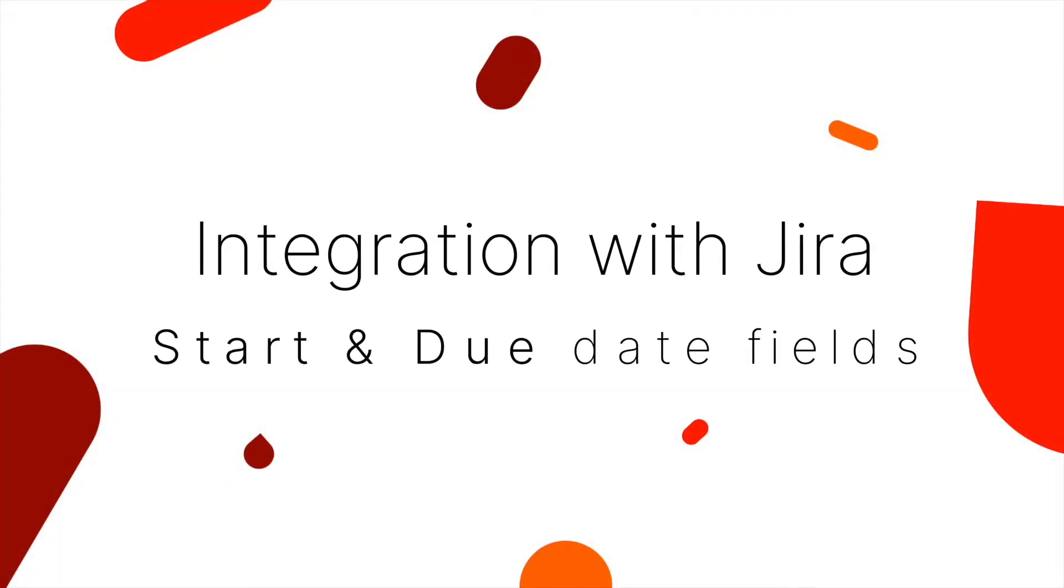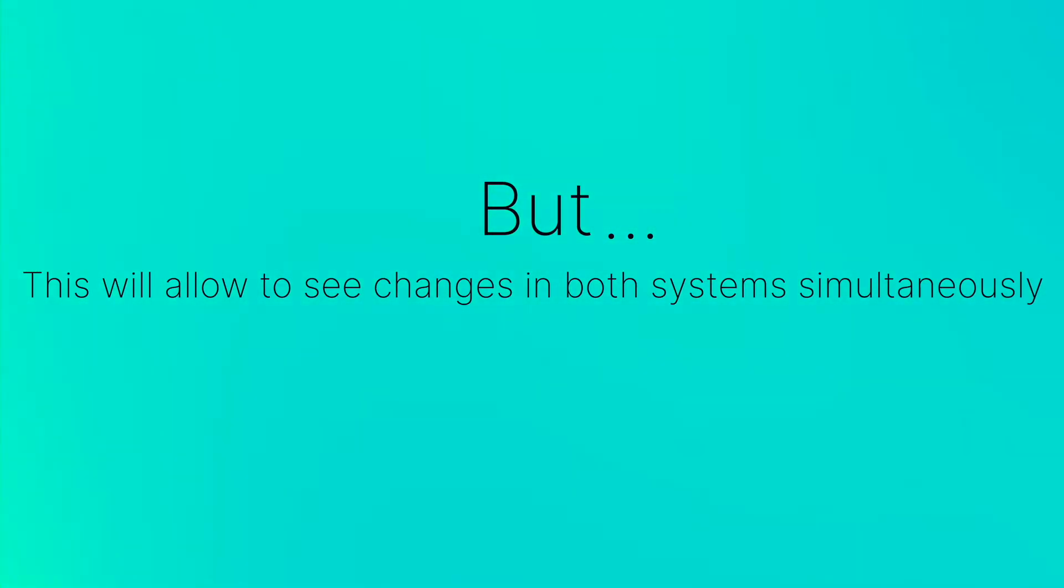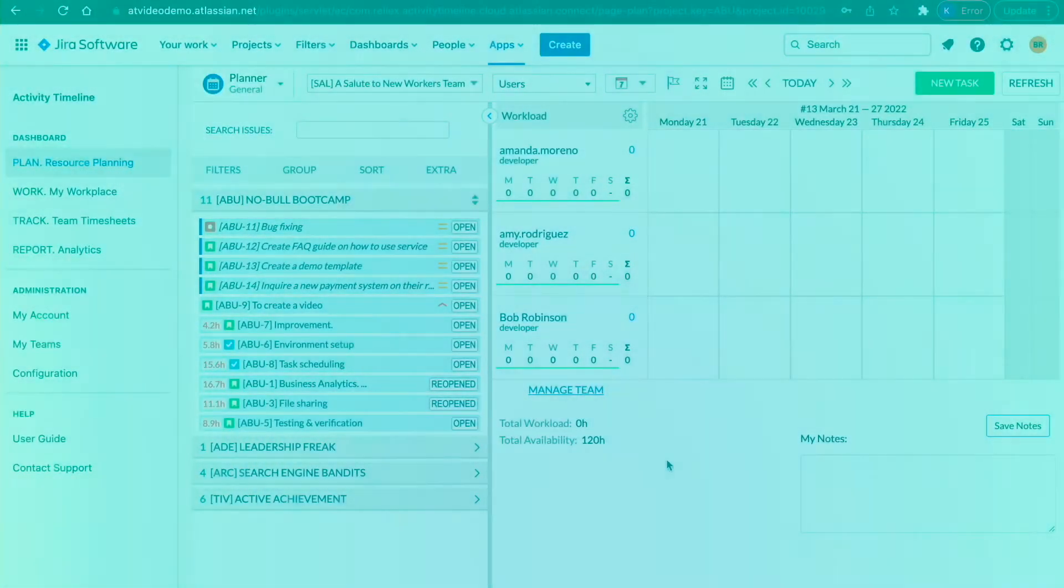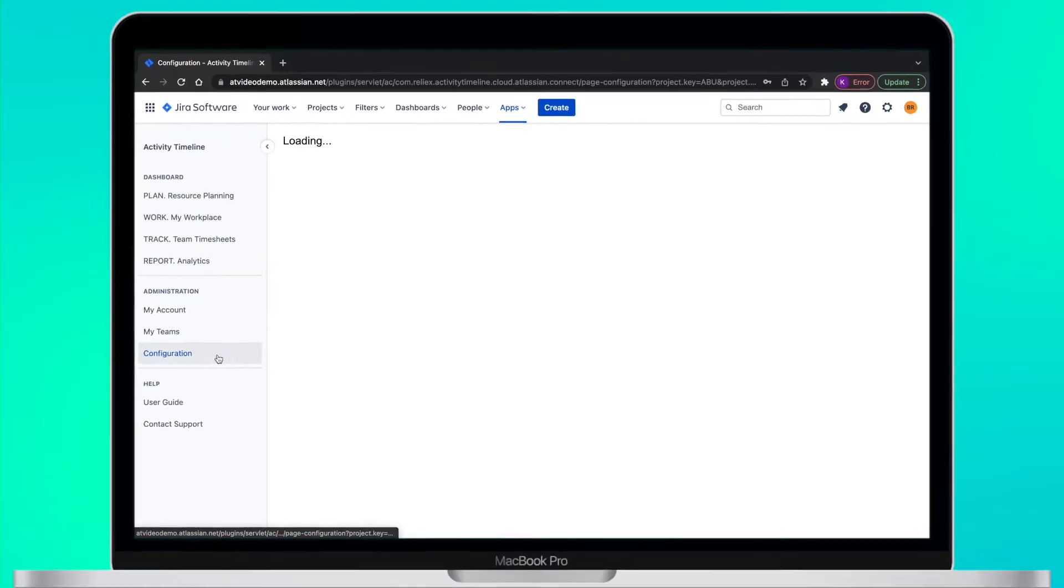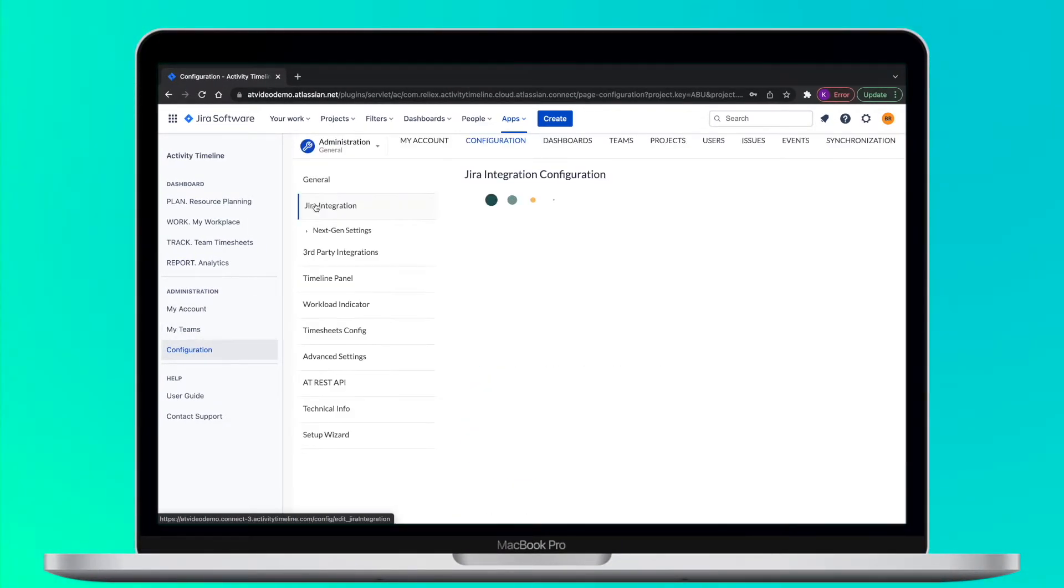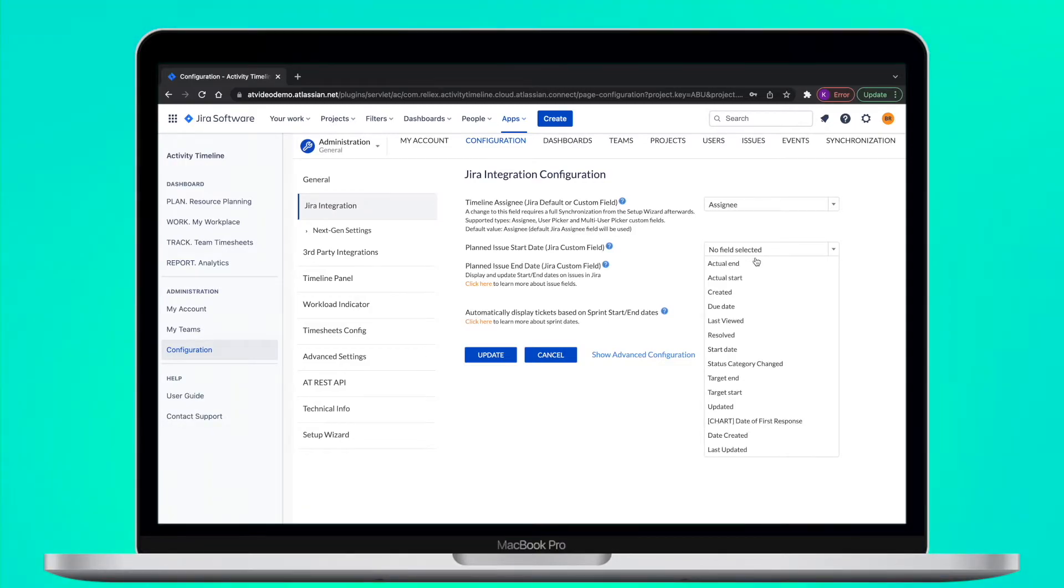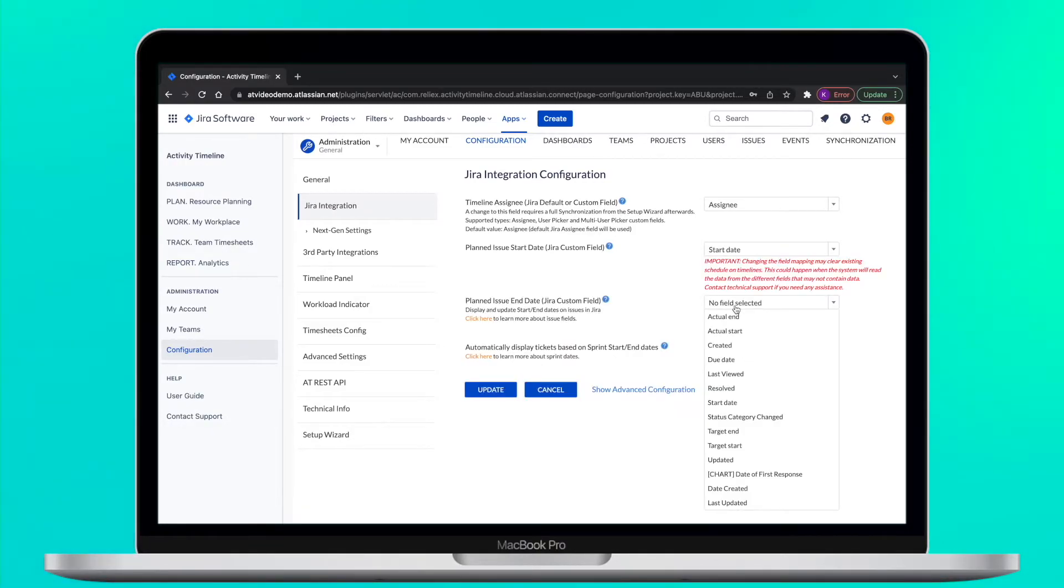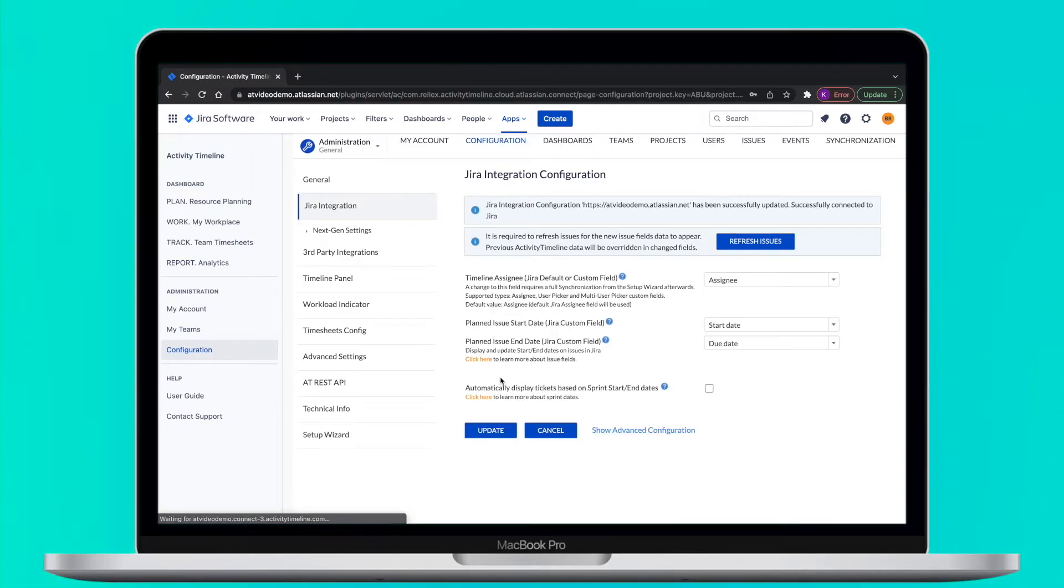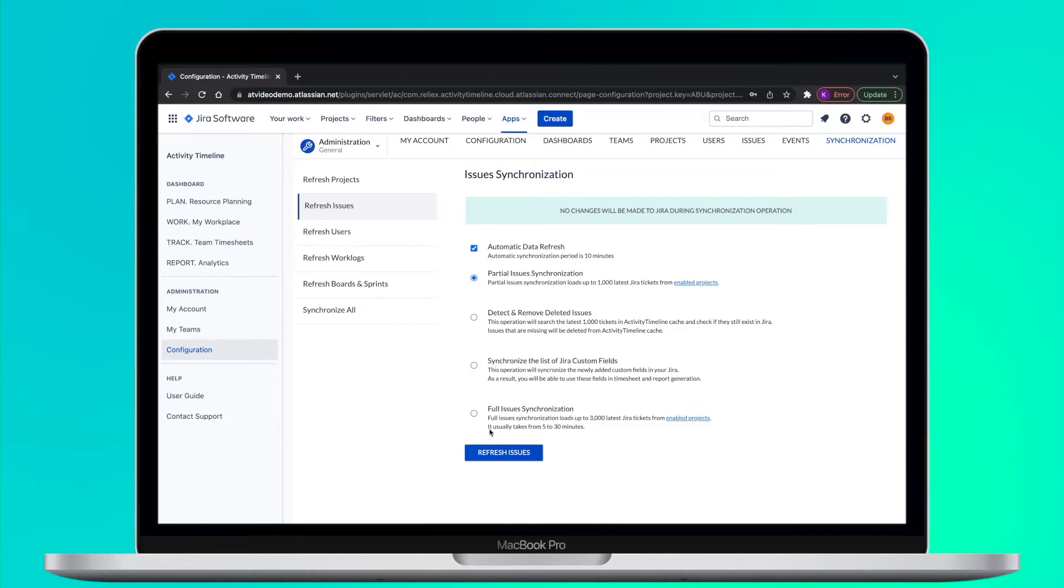When we have our users and teams in place, we can configure the integrations with Jira Start and Due Date fields. This is not a must for activity timeline to work but we strongly recommend doing this as this will allow to see changes in both systems simultaneously. Here in Configuration, Jira Integration tab, you have the option to select which Jira field should be mapped to activity timeline start and end date fields. We recommend using standard Jira start and due date fields but in general it could be any field you already use for this purpose in Jira. Select fields from drop downs and click Update. Now click on the refresh issue to make a quick synchronization to load any date from those fields that already exist in your Jira.